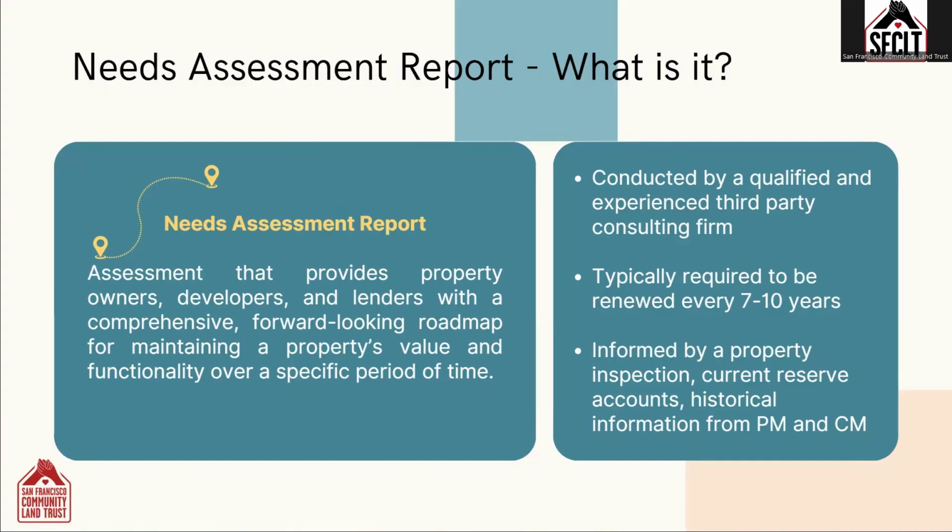These reports are conducted by a qualified and experienced third-party consulting firm and are typically renewed about every 7 to 10 years. The reports are often informed by a physical property inspection, by information about current reserves, and information about historical repairs and maintenance that's provided by the property management and construction management teams.